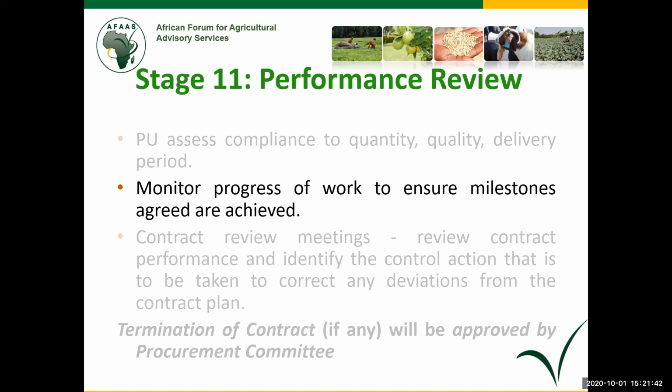achieved. And in most cases, I monitor through reports. So if you don't get me progress reports, if you don't get me any communications within your process, it puts me at a weak point to understand how the contract is moving. So user departments ensure progress reports and or any minutes and or even linking me to the discussions of what is happening at a certain stage at every stage would be advantageous.